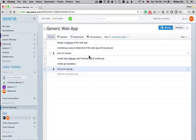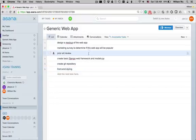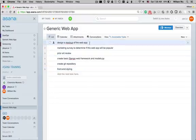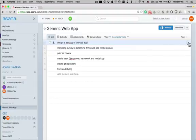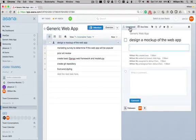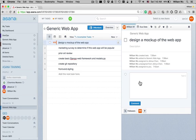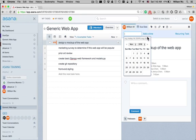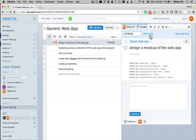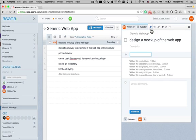Okay, so I have all these tasks here and now I need to assign them to different people. So, if I click on this arrow here, by clicking on this unassigned button, I can then assign it to a certain person. So, here I've assigned it to myself, and I'm going to set a due date for it to the 8th.